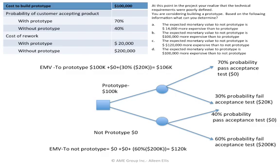The EMV to prototype is $106,000. The EMV to not prototype is $120,000. When I go back to the question and look at the answers, answer A is the best answer. It will cost $120,000 from an expected monetary value standpoint to not prototype — $14,000 more than the expected monetary value to prototype.